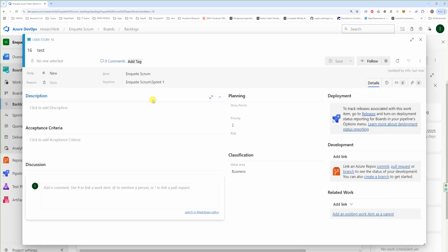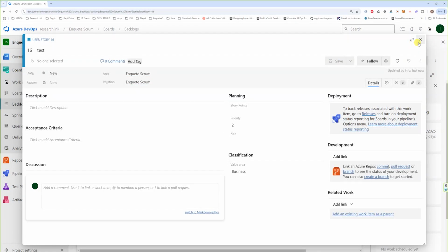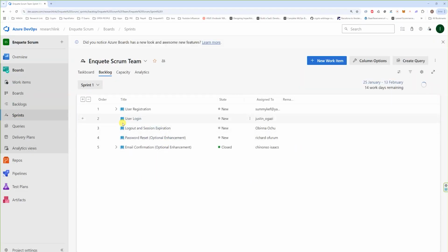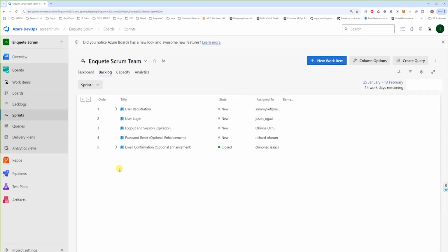So like I said, the backlog is a global collection of all items or all user stories we're going to work on. And a sprint backlog is a subset the team is going to be focused on during a particular sprint. I want you to be familiar with these two things. These are two popular views. If you click on backlog under sprints, you would see them. You see the view changes. If you click on taskboard, you see it in this format, and then you can add your tasks easily and move them and iterate them through different phases.